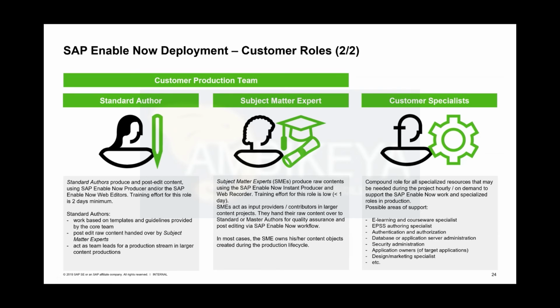This was never requested specifically in one of the older services, and this is what we made a mandatory part. We need to validate the recognition quality per application, mandatorily. So within the strategy and configuration phase, there is a mandatory part where we have the recognition quality and the recognition capabilities, and especially the re-recognition capabilities for EPSS purposes, as a to-be-documented mandatory part. That was always a big hiccup.